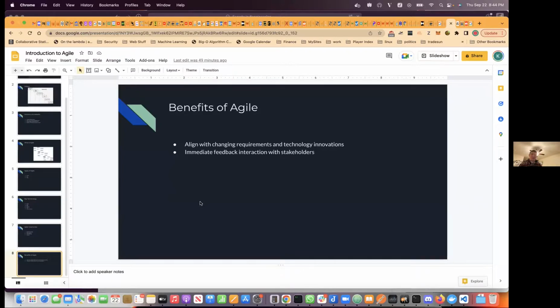So for people not familiar with Kanban, instead of planning for story points and planning your stories, you're bringing stories in, and it's all about work in process. So it's less about how many points you scheduled and your velocity. It's about how many stories you completed, and it's often used for people who are in non-functional requirement roles like DevOps, systems administrators, people who are doing work, but they aren't directly building the product. They're sort of building the supporting features, or they have other priorities like being on call.